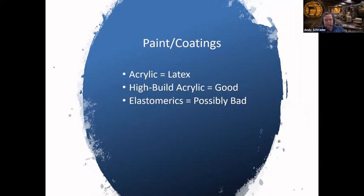One thing you want to be careful about is, we say, yeah, Sherwin-Williams is going to provide inspections during the project. Well, if I am a huge painting contractor, Sherwin-Williams really wants to maintain that relationship with me, right? So they will choose their words carefully and try not to throw me under the bus, because whether it's Sherwin-Williams, PPG, whoever the manufacturer is, if they were to throw me under the bus on one project, do you really think I'm going to choose them on the next project? So there are relationships there that, as condo association people, you want to be made aware of. With an engineer doing the inspections, that's less likely to occur, but there's still a possibility.